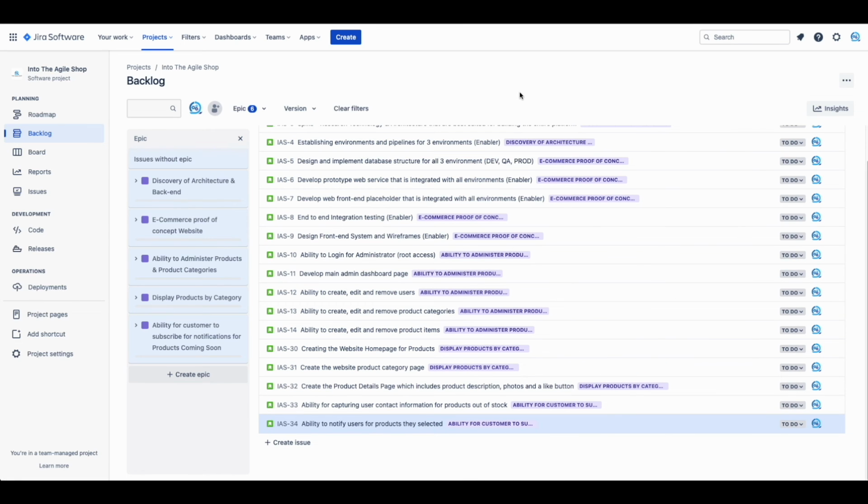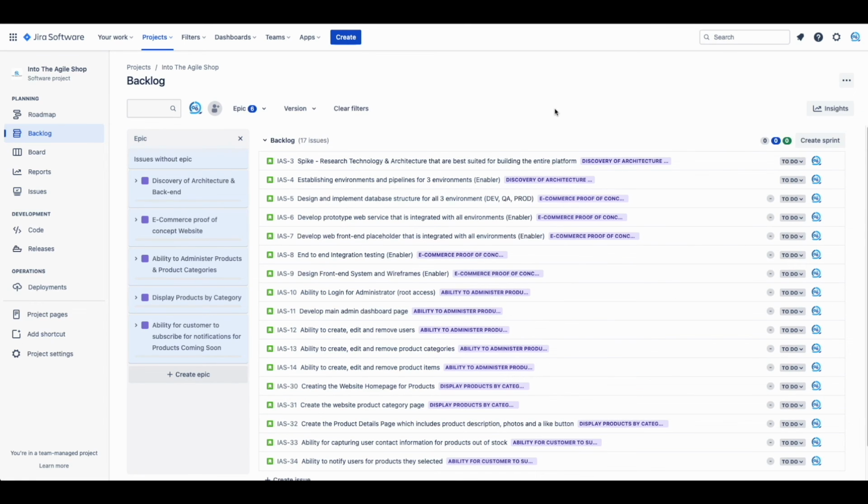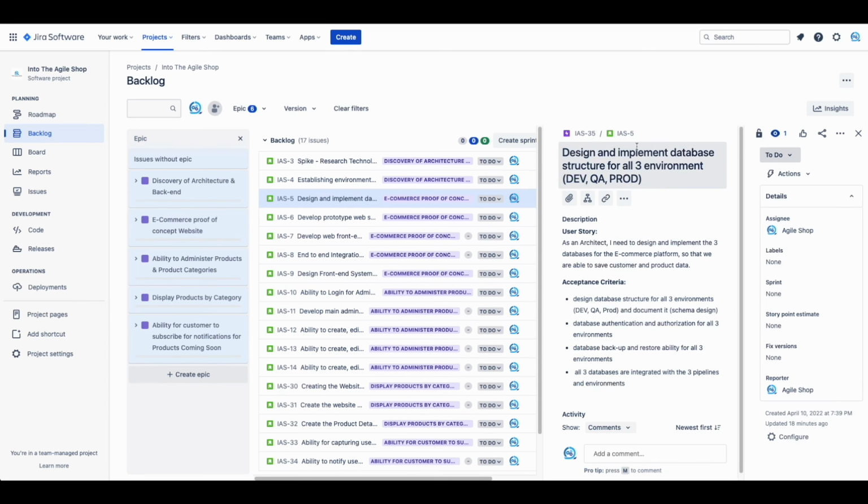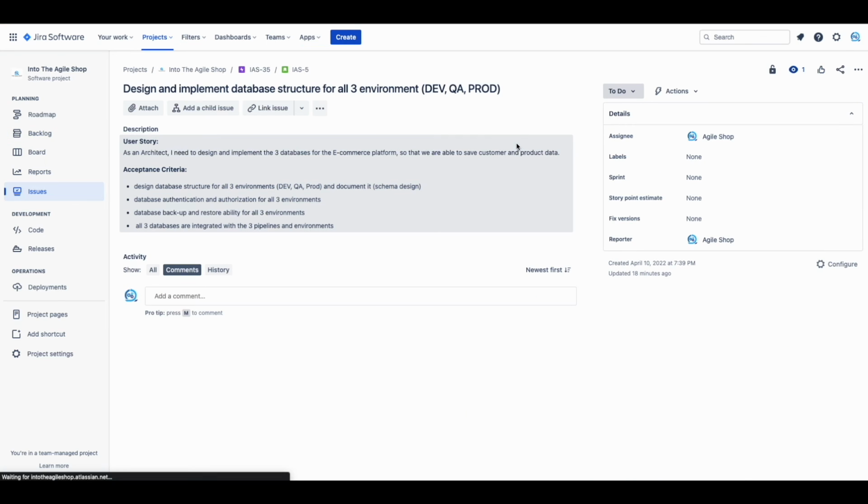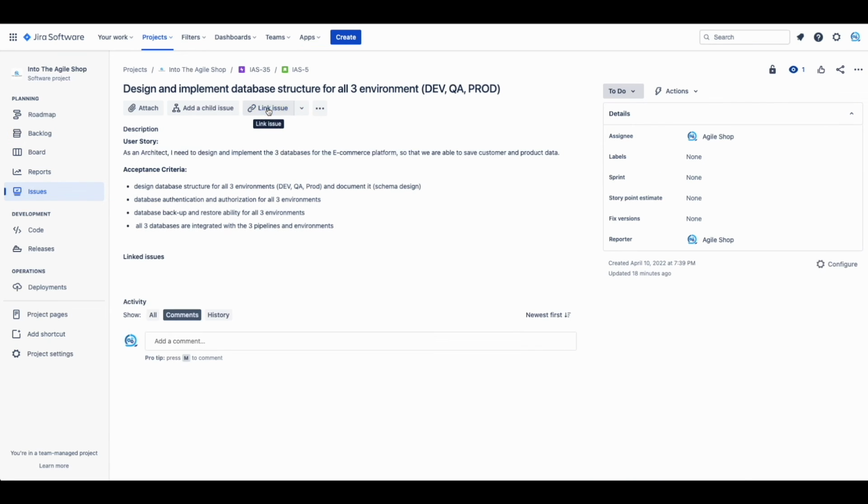The work listed in the backlog should be prioritized. For a feature team building a new product, prioritization should be easier since the work items should first be prioritized by their natural sequence of execution, while considering the dependencies outlined between user stories. The Jira backlog should be ordered with the highest priority at the top and the lowest at the bottom. The dependent user stories should be linked to their dependent counterparts.